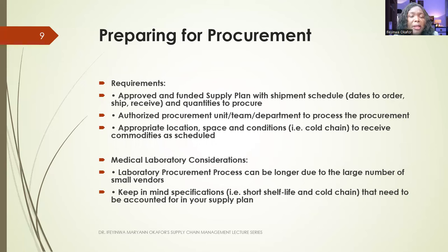Preparing for procurement, there are things that you need. Requirements. One, an approved and funded supply plan with shipment schedule, dates to order, ship, receive, and quantities to procure.